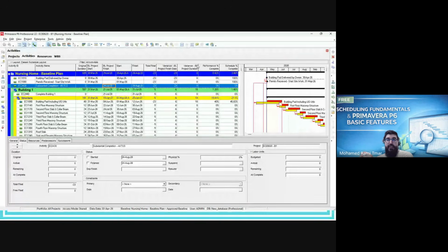But in parallel, maybe he has a problem of the critical activity. So to hide this problem, he will start earning progress in non-critical activity, which is possible. Earning and preponing this activity and progressing the work in non-critical activity, and as a result, he will mislead the KPIs.